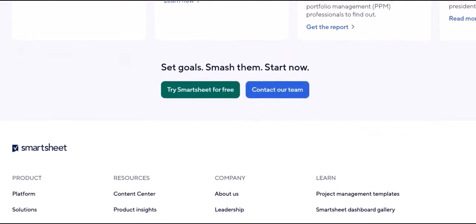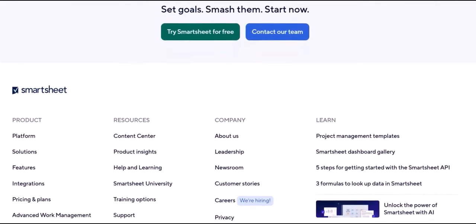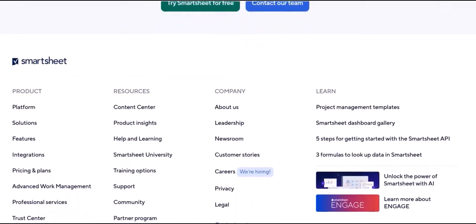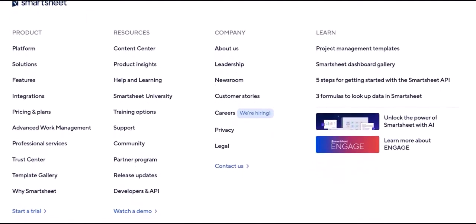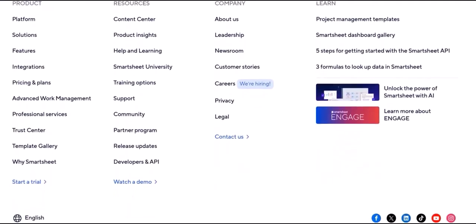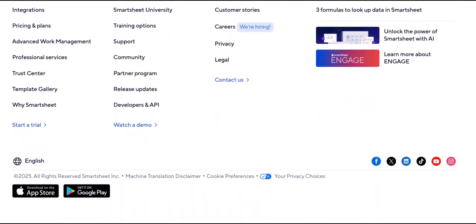Column types: Smartsheet will try to guess the column type, text/number, date, drop-down, contact list, etc., based on your Excel data. You might need to manually adjust some column types to optimize functionality, e.g., convert a generic text column to a contact list column if it contains team member names, or to a date column if it contains dates that weren't correctly identified. This is crucial for enabling features like automated reminders or proper resource allocation.